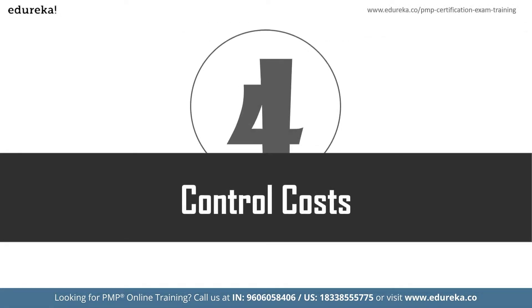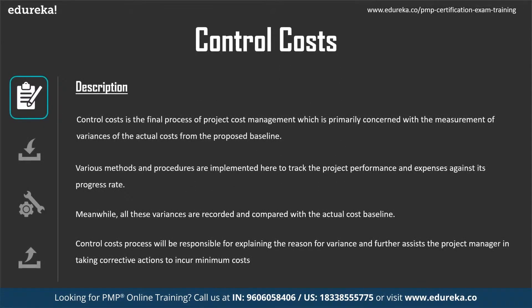The final process is control cost — the process of monitoring the status of the project to update project costs and managing changes to the cost baseline. It falls under the monitoring and controlling process group. Control cost is primarily concerned with measuring variances of actual cost from the proposed baseline, implementing methods and procedures to track project performance and expenses against progress, recording all variances and comparing with actual baselines, and raising change requests where corrections are required.